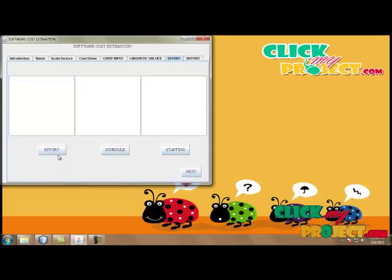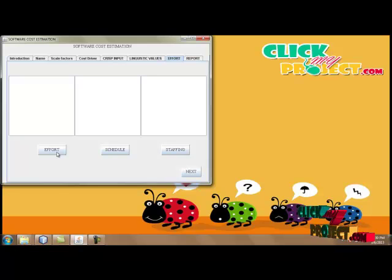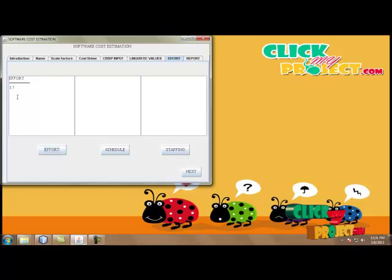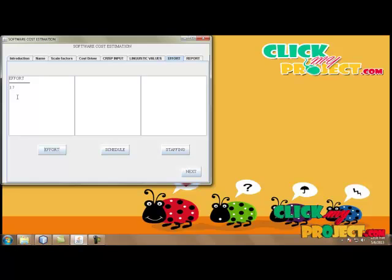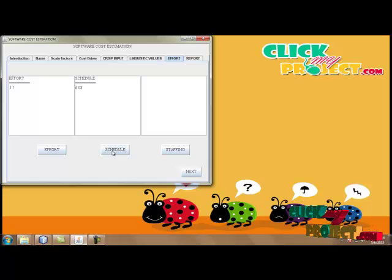Then we move to the effort calculation. By clicking Effort Calculation, our crisp inputs are converted into linguistic values. The effort is estimated using the effort formula: A × (size)^E × cost drivers × scale factors. So the effort is calculated. Here our effort value is 3.7. By clicking Schedule, the schedule for that process is calculated — the schedule shows how many months it takes to complete the effort of our process.